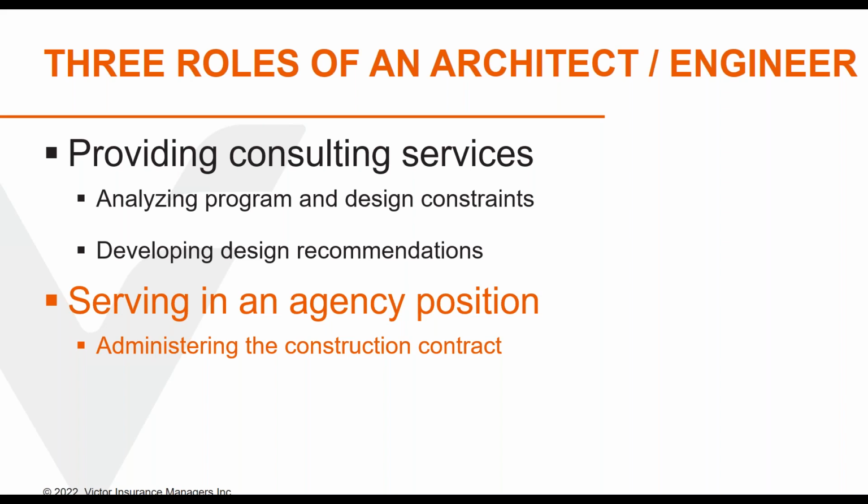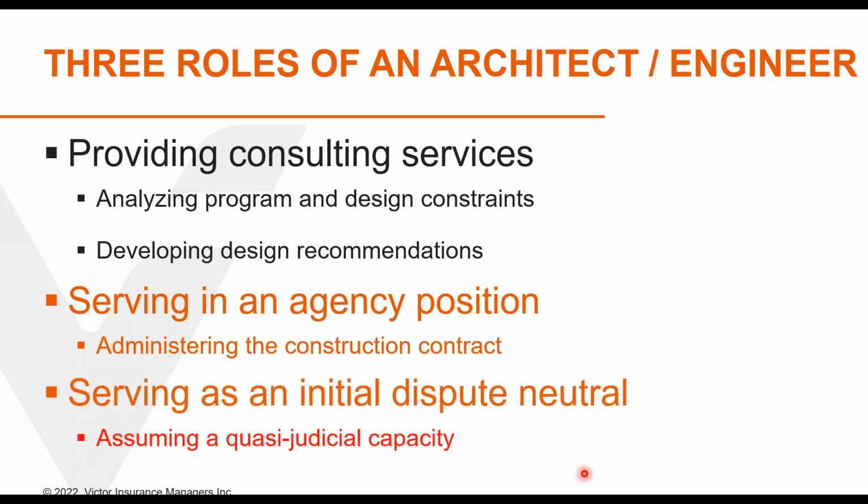And then oftentimes, there are questions revolving around, well, what was included in the construction documents? What is not included and therefore should be an additional cost to the owner that the contractor is entitled to? All of these things may well come up during construction, and oftentimes it's up to you as the architect or engineer, if you have that role, to serve in a quasi-judicial capacity. You're acting more or less as a referee, to call it as you see it based on the contract that is in front of you.